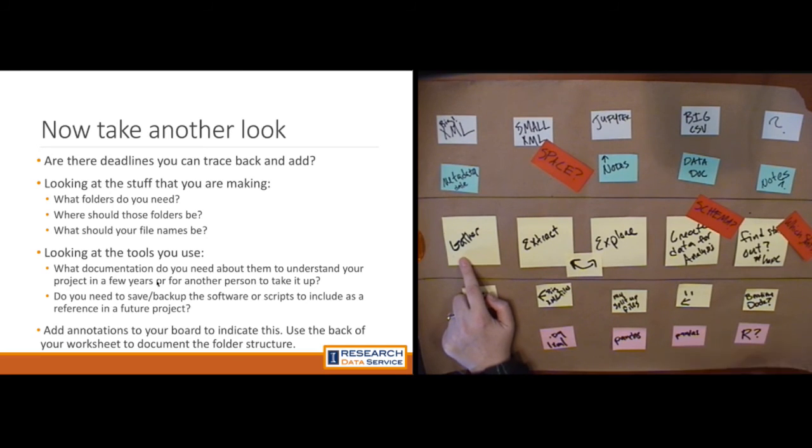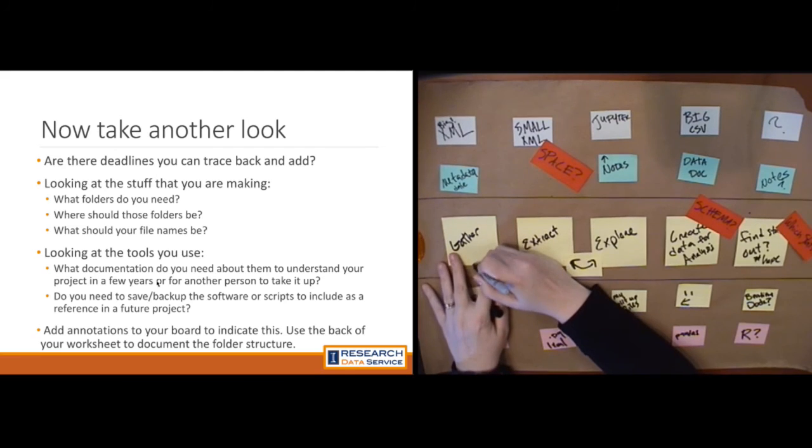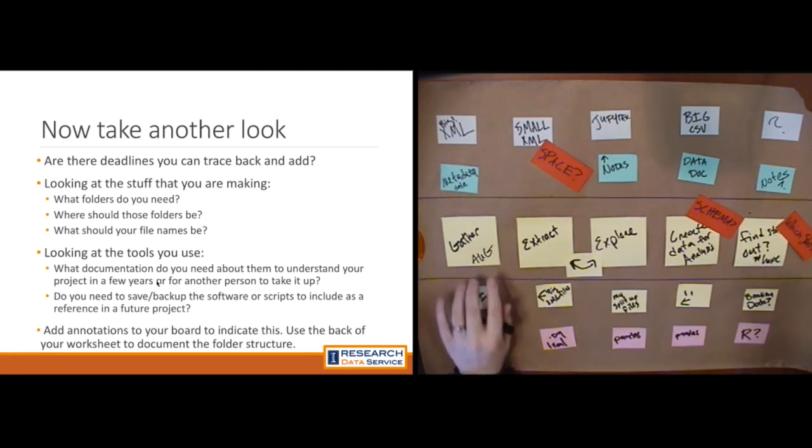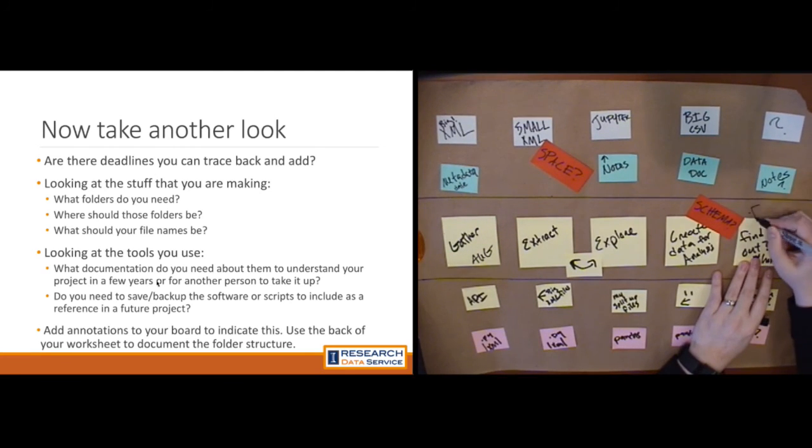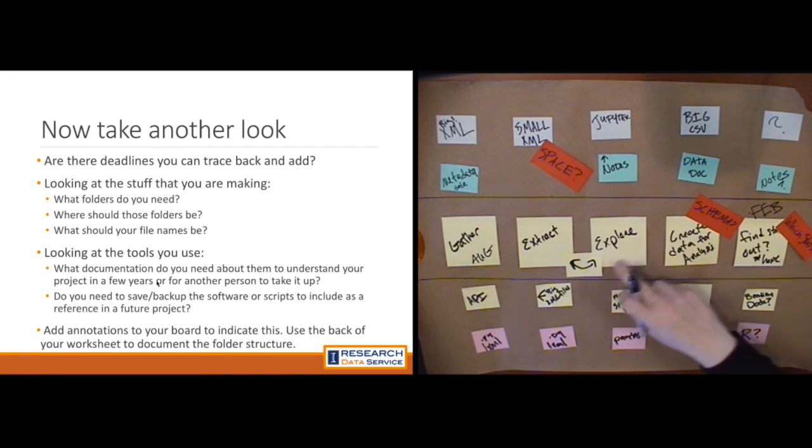And I know that in May, we have a deliverable due for analytics, or at least we know that given the publication process, we need to have this analytics at least started by February so that we can have something out the door by May for that conference. And so if you say, I know this is going to happen in August here, and this needs to be February, then you can extrapolate which months these need to be due.